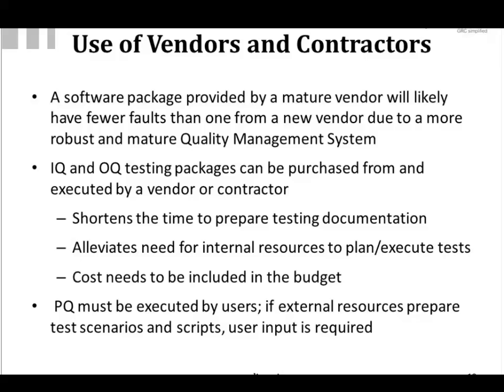But make sure you include the cost in the budget for the IQ and OQ testing and packages if these are added into your project. Now, PQ has to be, again, performed by users. If you have external resources that prepare the scenarios and scripts, that's okay, but at the same time, user input is required. So they must have a way of interviewing your users to understand fully how they're going to use the system in their own environment. But then again, they have to execute the testing, your users.